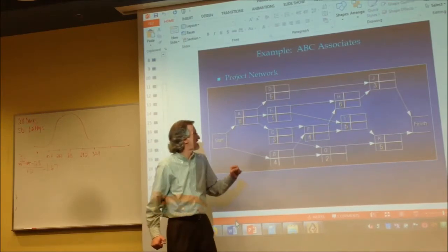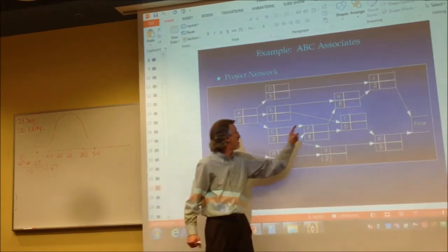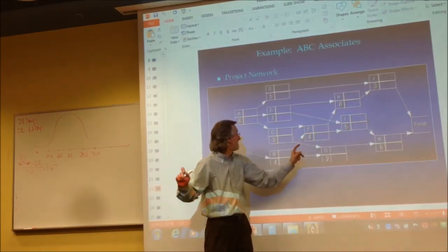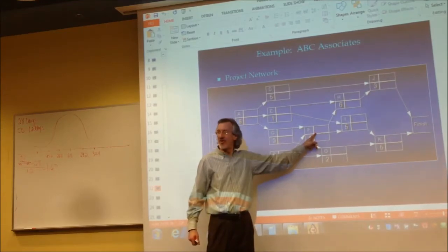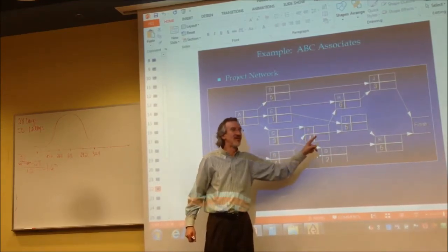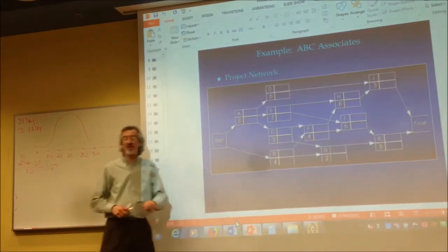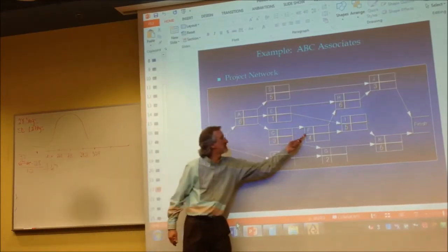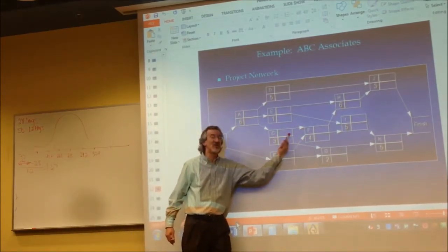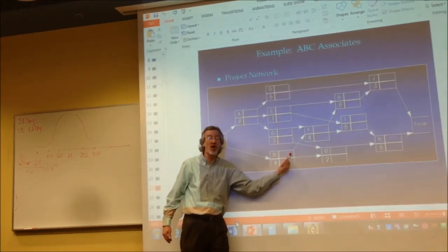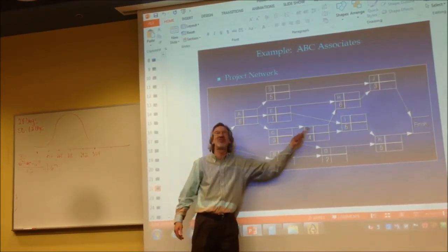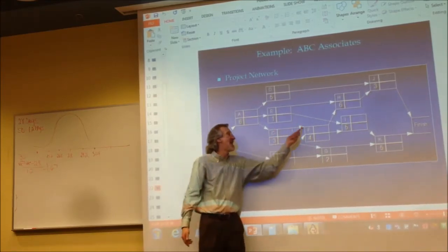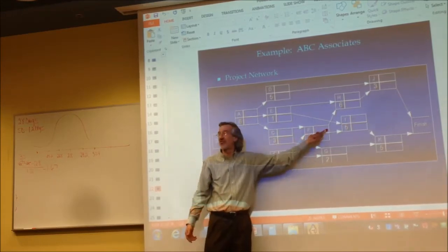You're on the track. Let me just test you here, see how good your memory is. Earliest start for F. Let me think this through before you answer. I got to think a minute. I forgot already. Okay, got it. 9. Yes. Thank you, Eric. 9, because it's preceded by 2 different activities. C's earliest finish is a 9. B's earliest finish is a 4. Both have to be done before F starts, so even if this finishes at 4, it's got to wait for this one to finish, which is 9. 9's the earliest start. Add 4, we're at 13, right?